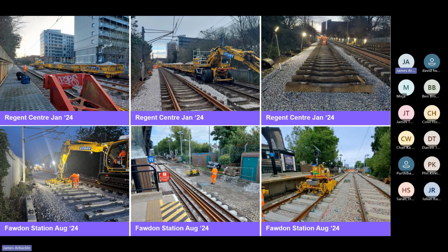In terms of our design scope, we had a really clear technical work scope at the beginning, which defined it very well. Any scope creep that doesn't match up with that original work scope is outside of that scope. So we constantly refer back to it and the big requirements, and we monitor against that. I don't know how it's managed in terms of the wider project budget.